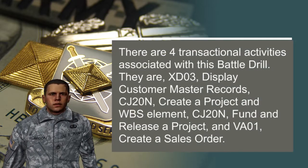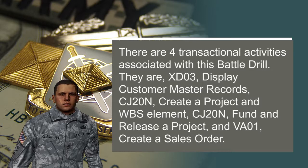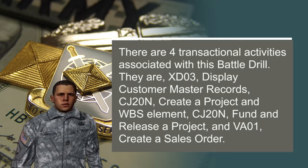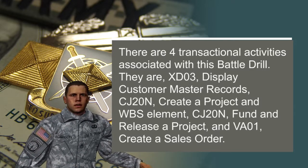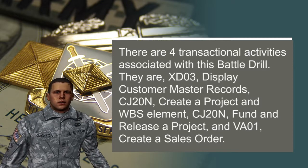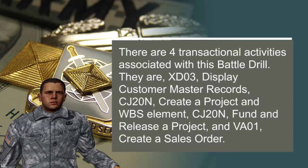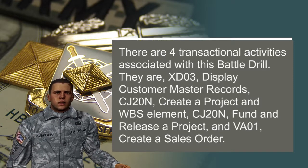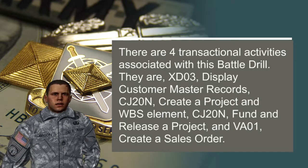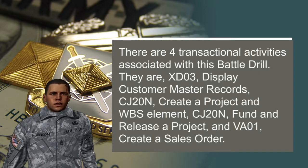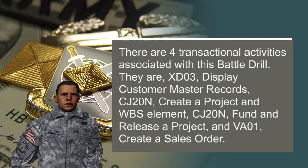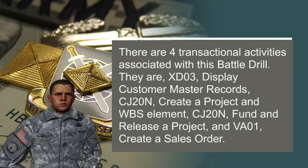There are four transactional activities associated with this battle drill. They are: XD03, Display Customer Master Records; CJ20N, Create a Project and WBS Element; CJ20N, Fund and Release a Project; and VA01, Create a Sales Order.